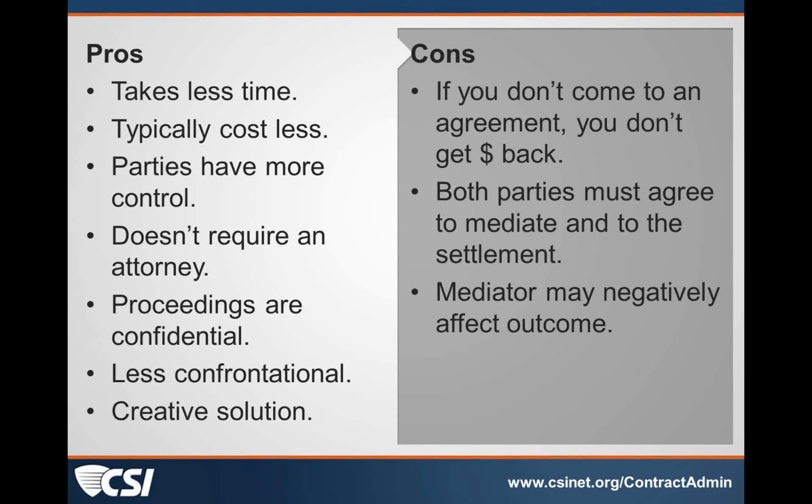If the contractor is not being responsive in supplying you the information you need to evaluate the claim, that again is a contract issue. I know the AIA has it in their general conditions that the contractor is obligated to provide the additional information that the architect, or whoever that initial decision maker is, needs to make those decisions.